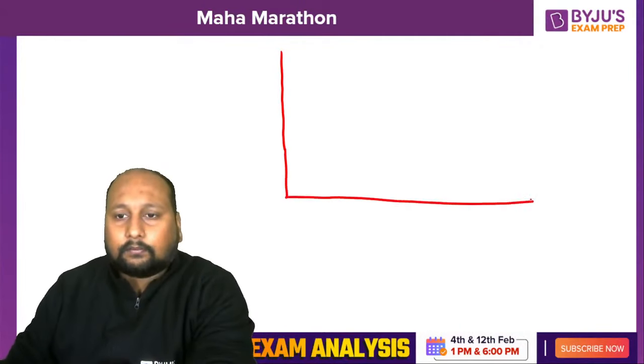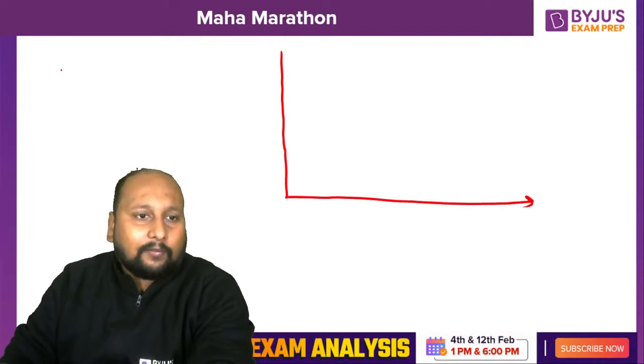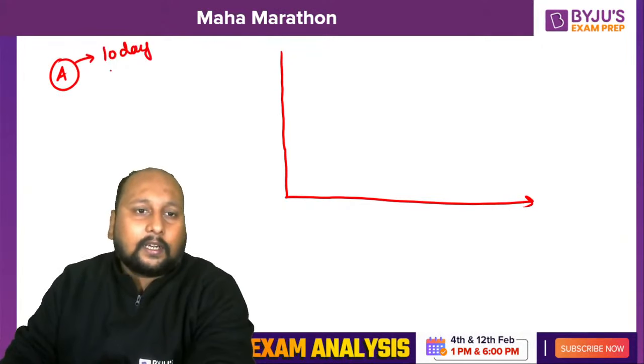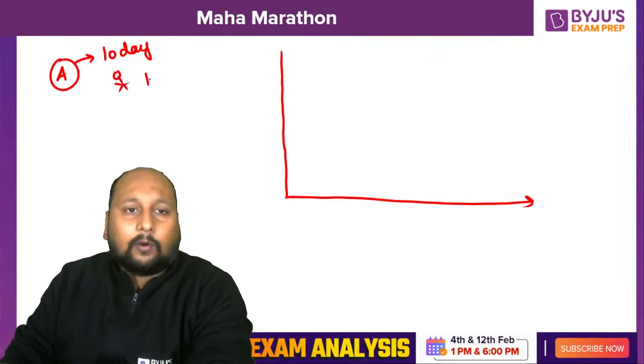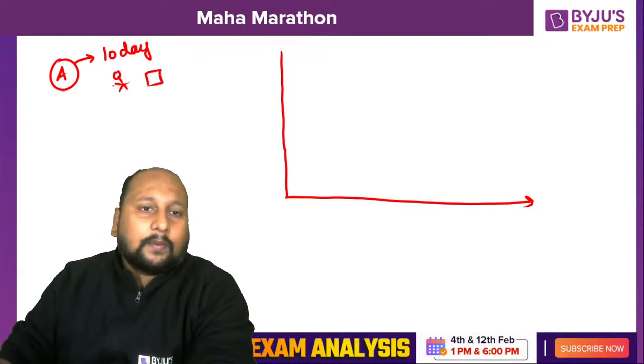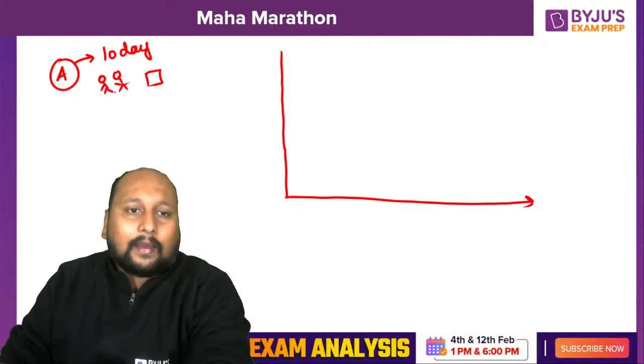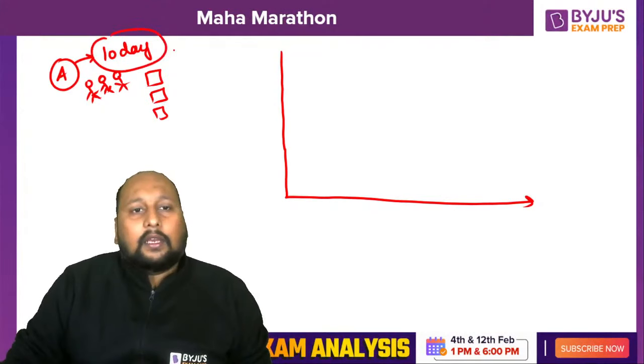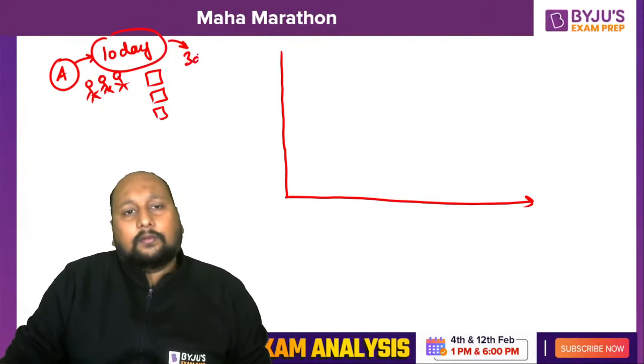Okay, it's quite easy. Let us suppose that there is an activity A which is completed in, let's say, 10 days, and for completing this activity only one person and one machine is required. But what has happened, like I have increased the manpower from 1 to 3, right, and increased the number of machines. By doing so, we can complete this activity in, let us suppose, 3 days.